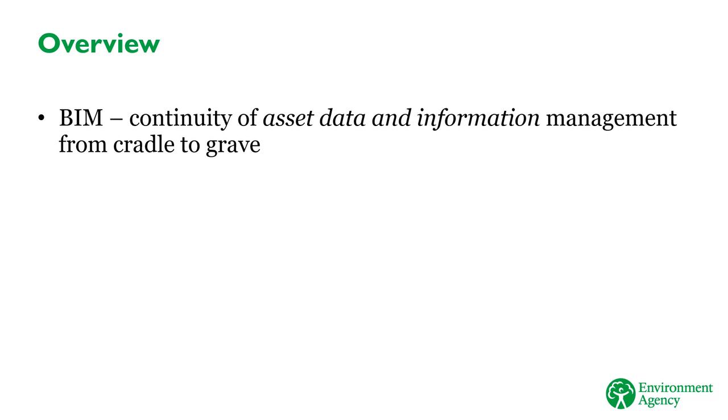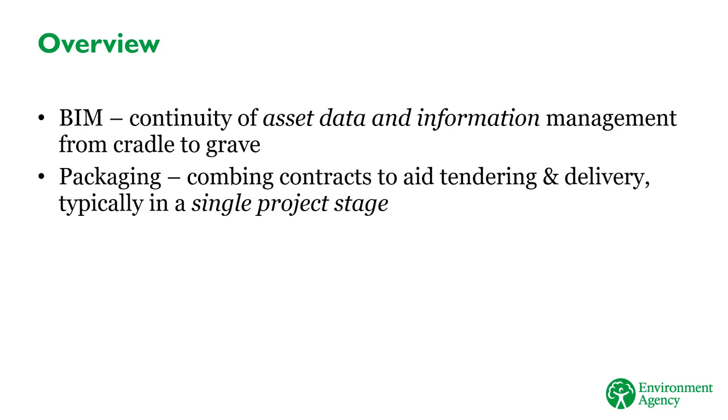In the first e-learning module, we learned that a key goal of BIM is to ensure that asset data and information is captured consistently throughout a project, so that it can be used later on in the operation and maintenance phase. The goal of packaging during projects is to combine the contracts for work being done on several projects into one, to make tendering and delivery of the work more efficient.